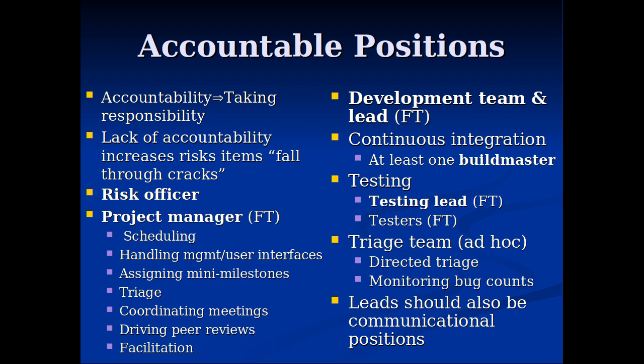The project manager, the point of contact, is going to be the one who has the kind of canonical understanding of the client's needs and keeps track of them. And make sure they're reflected, say, in a requirements document, some updated record of what the client wants that can be spread around the team, rather than repeated by the client to some people and not to others who don't know about it. So by coming into the project manager, they can disseminate. What other reasons might there be?